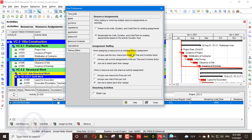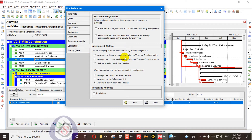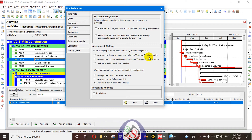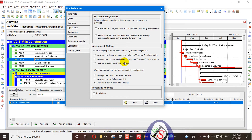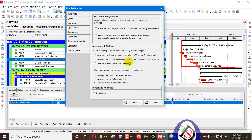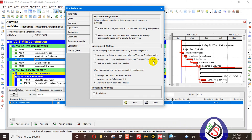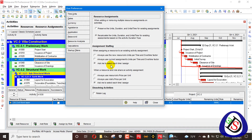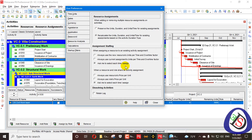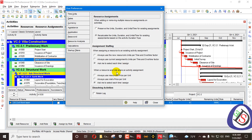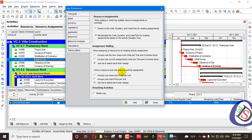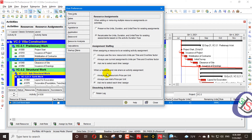When assigning a resource to an existing activity assignment, there are three options: always use the new resource units per time and hour time factor; always use the assignment's units per time and hour time factor; or ask me to select each time I assign. These are the settings when a resource and role share an activity assignment.